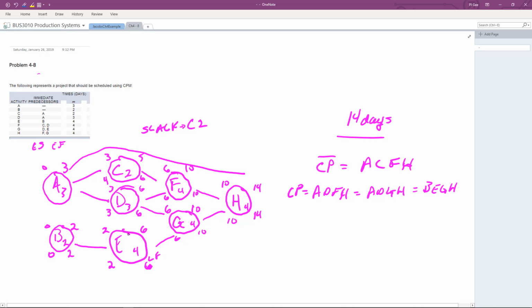Okay, so when we're moving backwards through the system for the late start, late finish, then we have to look at the critical time here, which is 3. Okay, what's the earliest of the two? Comparing the 4 and the 3, the earliest is 3. That's how we decide we're going to move this over to the predecessor. 3 minus 3 is 0.